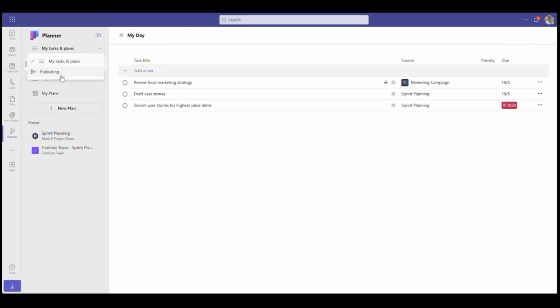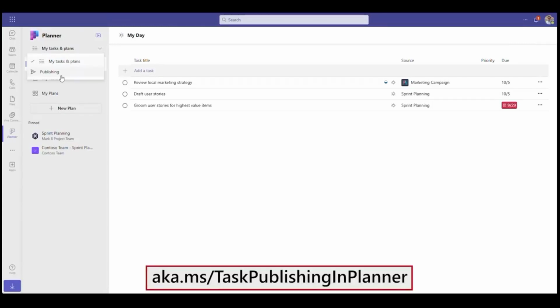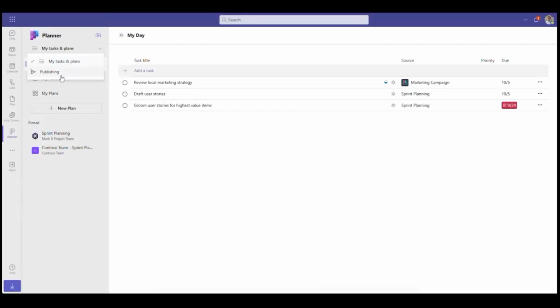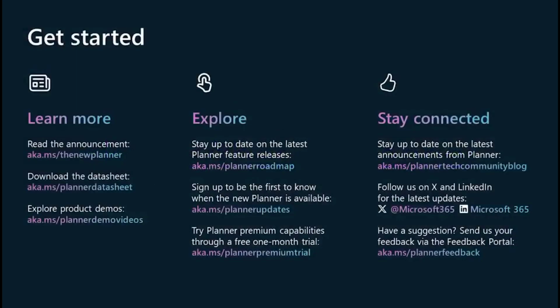Project Online: Project Online is the full-fledged tool for project, portfolio, and resource management. Mapping dependencies between processes and recalculating the entire schedule in case of delays, as well as a central resource pool, are only three of the many differences compared to Microsoft Planner.